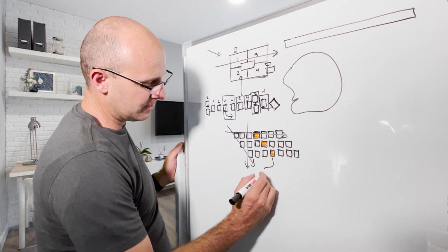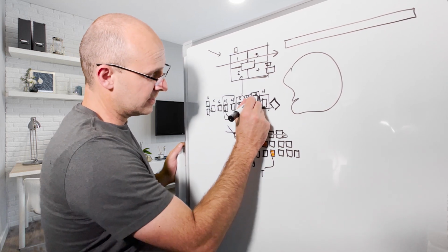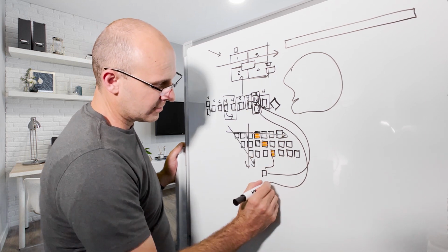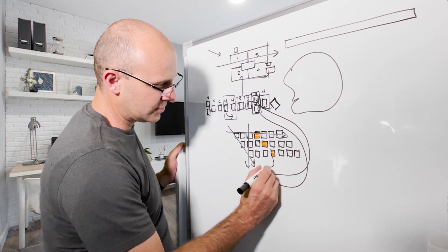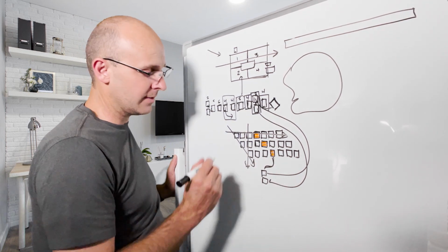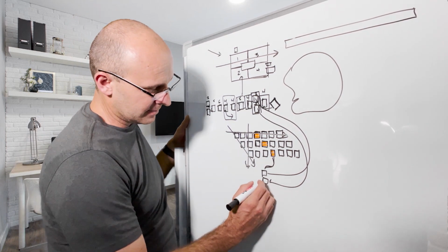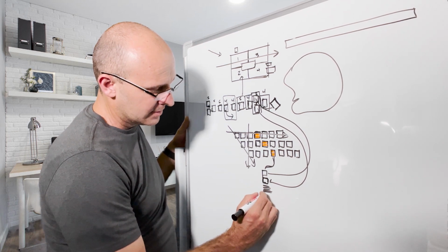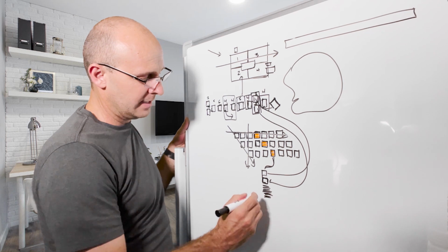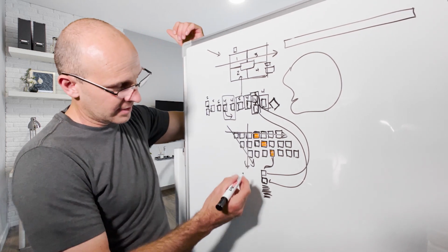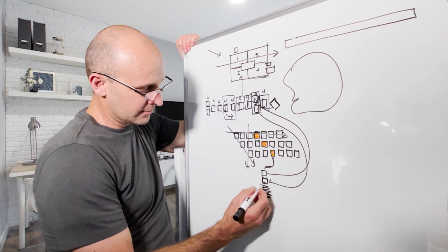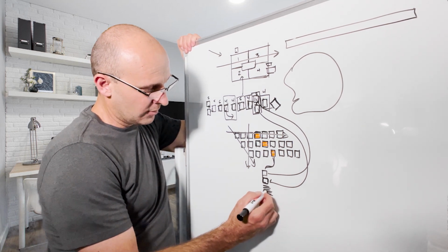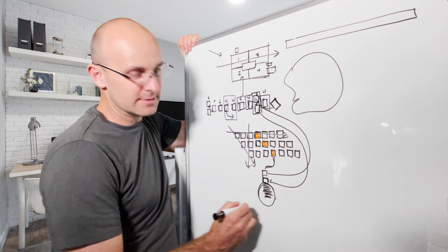So the work package would be, hey, this one trade, that's one work package. This other trade, that's another work package, and those two will loop into that one Takt wagon, right? So here's the genius of the system. Each one of these work packages has work steps. So if it was overhead, it would be install mechanical overhead: install overhead hangers, run large duct, run branch lines, put in overhead mechanical equipment. There's work steps down here.